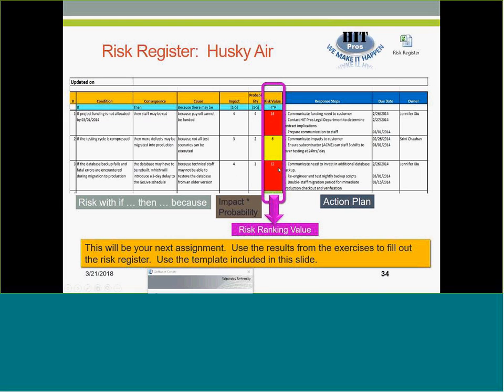And this is qualitative risk management. As I said, that's more frequent in organizations. And we develop response steps. We ensure that all response steps have a due date, and then we have our owner assigned to this, right?